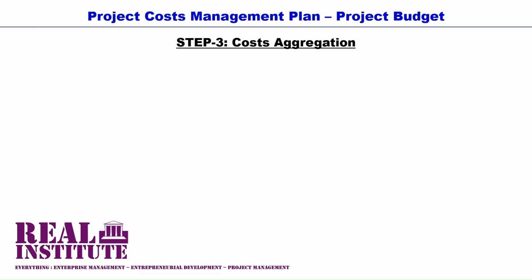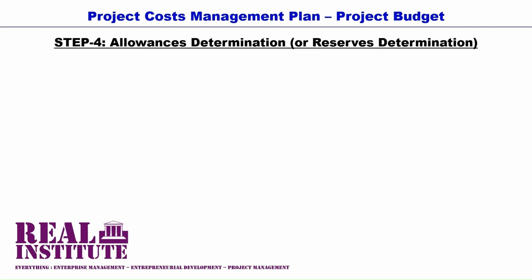However, as the old adage would have it that hindsight is the only perfect science, and that it could be a self-fulfilling prophecy, project management practice does then try to offset any unforeseen future threat to the estimated project total cost by permitting some allowances to be determined based on certain factors and then added to the estimated project total cost so as to arrive at a project budget or a project price that can be baselined.